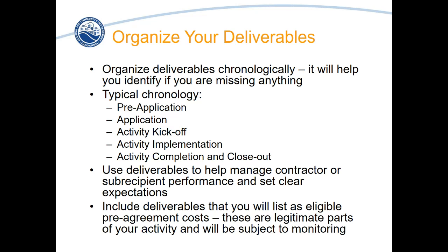So we do have some language. We've talked about some of the reports that we're requiring. Financial reports, that's what's going to be your funds requests from here on out, so those are called financial reports in the grants management system. Those are going to be required quarterly. We have activity reports, which are also going to be required quarterly. We have semi-annual reports, the same types of semi-annual reports we've always had. We have some annual reports, very similar to the annual reports we've always had. We've got those mechanisms; those are sort of the baseline requirements.